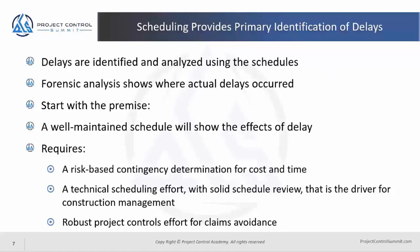To make sure we can identify delays and do something with them, I believe it requires first a risk-based contingency determination for cost and time. Every project should have contingency — it should be risk-based, identified based on a risk register of risks, not just a percentage. We can carry that in costs. The industry usually doesn't have a strong appetite for carrying time contingency, but we can carry it in a management reserve, or we can go into the schedule and make sure there's adequate time.